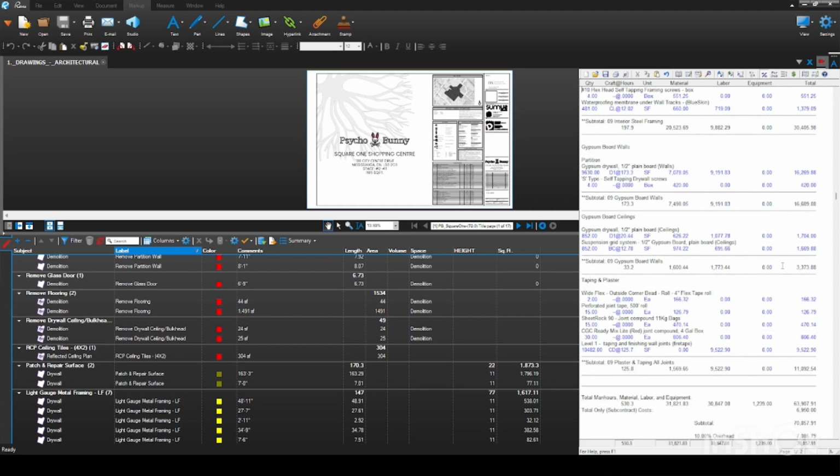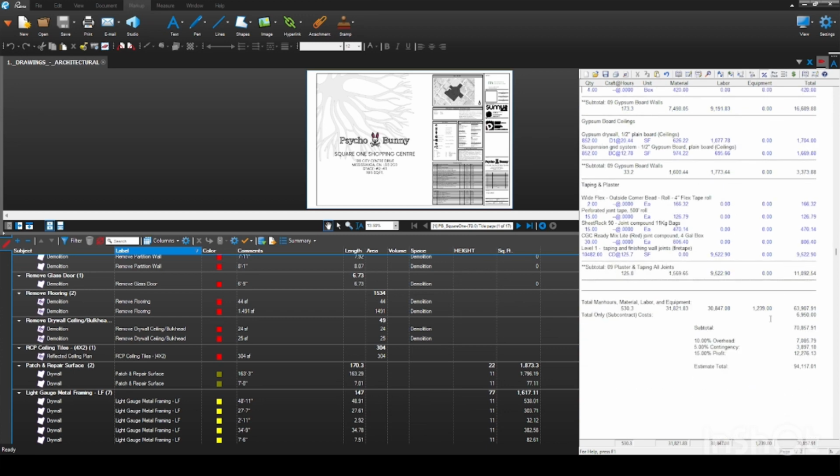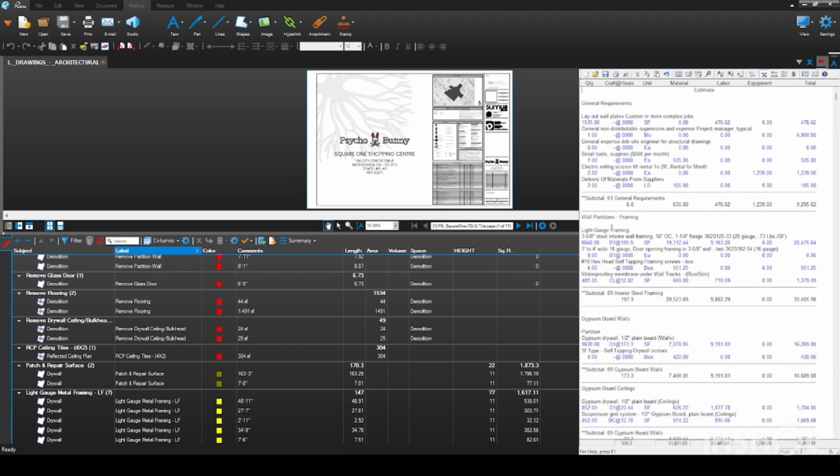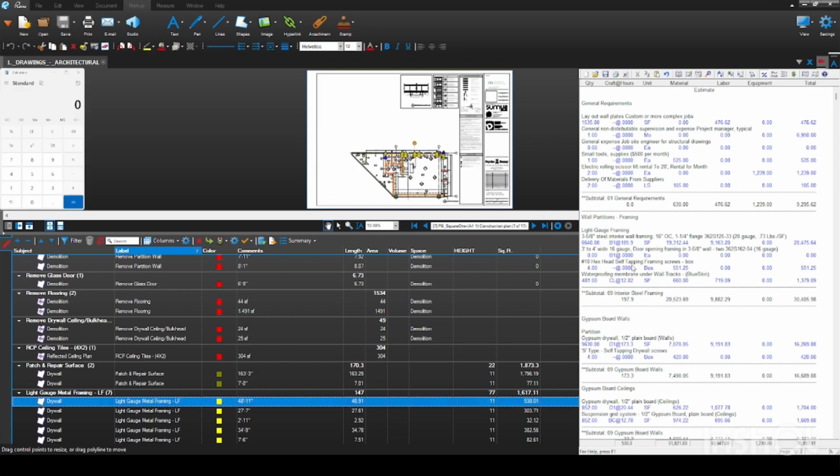As you can see, I'll just start to go through the estimate. Here's the total. Everything here will change. So you can see the overhead, the contingency, the profit. We'll get to those details later, but let me just continue to go through this and update all the information that I have. So I'd usually add 10% waste to each item, 10 to 15%. So I'll just take this total here of 16,17.11, and we'll do 15% waste.